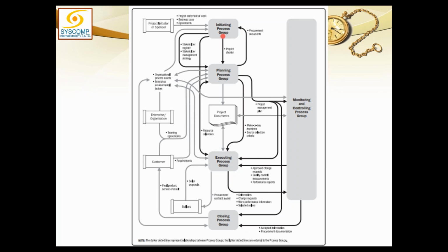So identify stakeholders is another process in initiation which the project manager must do. He should not start planning at this stage. He should just earmark all the sponsors, analyze them, group them into some order of priority, and devise a stakeholder management strategy. So he will create a stakeholder register, or a list of stakeholders, and his strategy to deal with different kinds of stakeholders.